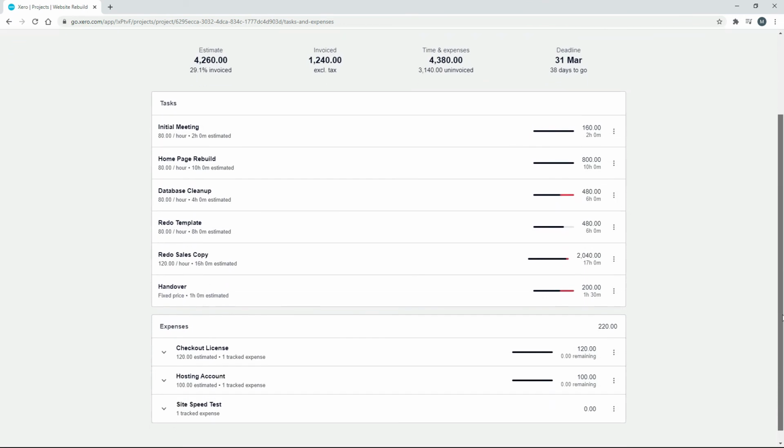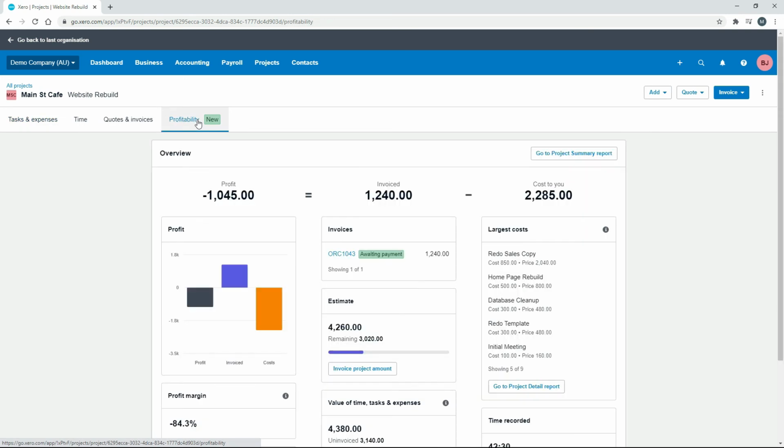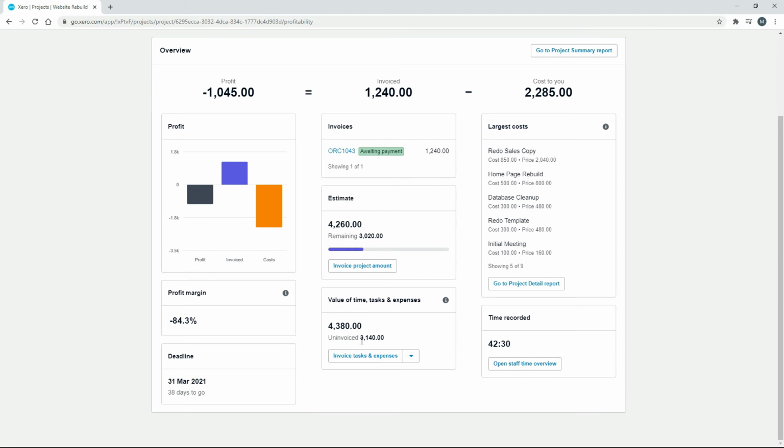Okay, and that's done. All right, so before we send the invoice, let's just have a look here. We've got $3,140 uninvoiced. We've already invoiced $1,240. And then we've got our profitability report over here. And you can see at the moment, because we haven't invoiced that 3140, it's actually showing a loss in the